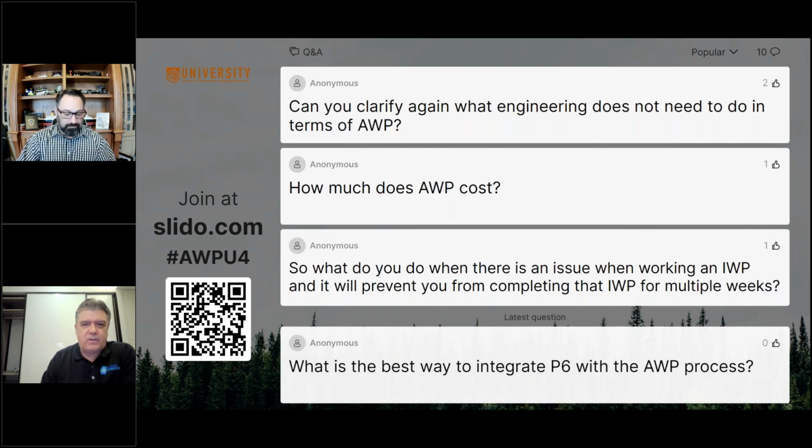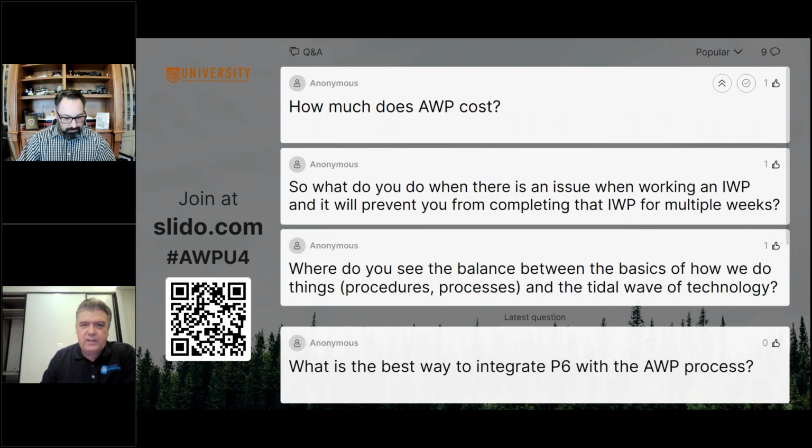The work breakdown structures that engineering have developed since the advent of 3D tools work well to get engineering done. They could be made better. I'm not saying there aren't engineering efficiencies that can be introduced, but nowhere was there suddenly a need to say engineering should be attributing. CWP is not an attribute. One tag falls into multiple CWPs.